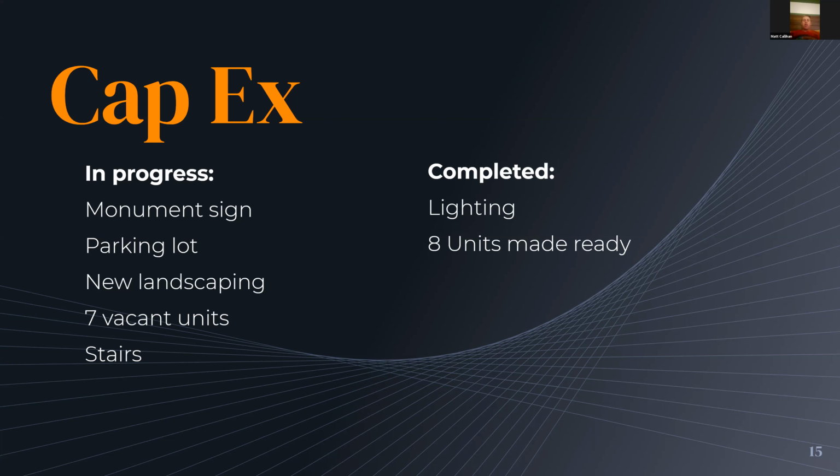So our CapEx projects are all going pretty well for the most part. Monument sign is getting done. I'm not sure if we have pictures, but it would look like a metal skeleton of a sign. Nothing too exciting yet, but we're hoping to roll that out once it's installed. Electrical's all been laid for the new monument sign, still shooting on first week of July to put that sign in. Parking lot should be done hopefully by the end of this week.